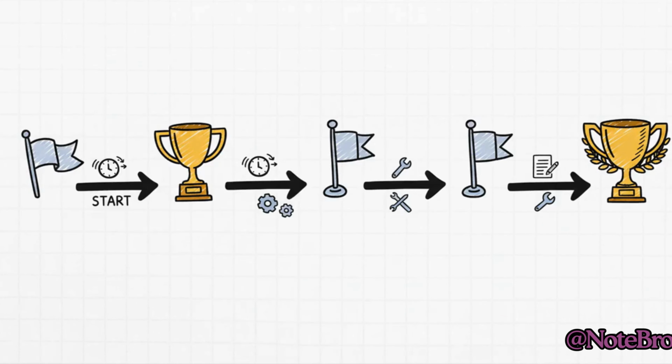Let's zoom in on project management for a second, specifically a technique called PERT. It's a little different here. In this kind of model, the dots, the vertices, they aren't the tasks themselves. They're the milestones, like foundation poured or framework approved. The lines connecting them, the edges, those are the actual tasks, and they're usually labeled with how long they'll take.